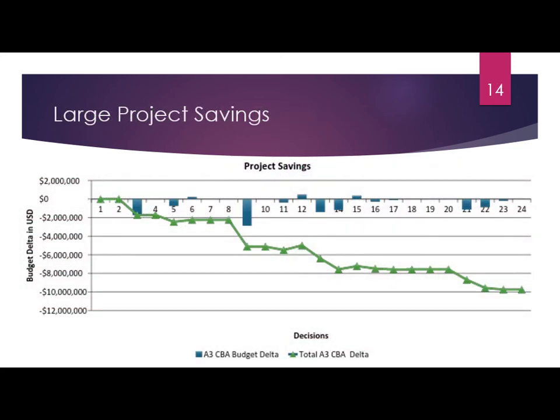And these are the results. After each decision, the budget changed. We did an analysis of importance of advantages versus costs, and this is how the cost of the project was going down overall. Not for every decision, but the team was able to find a solution compared to the baseline of the project; they had the budget baseline.